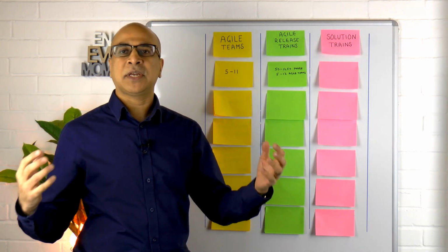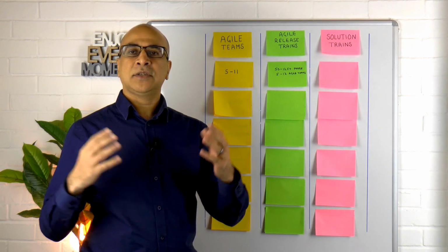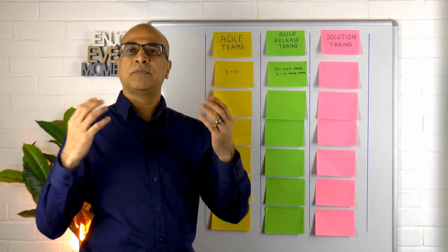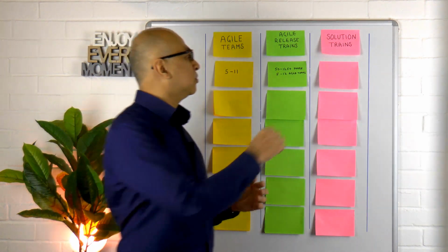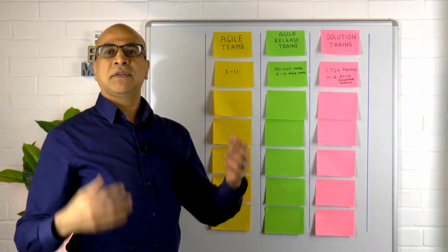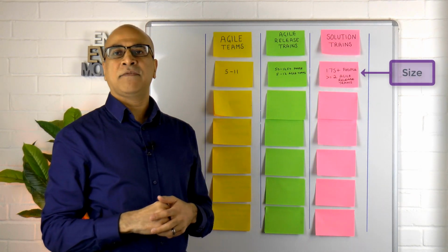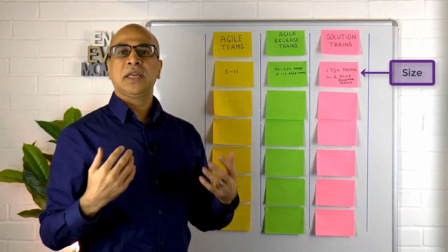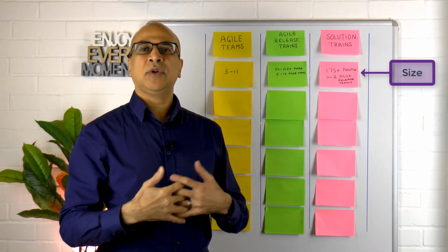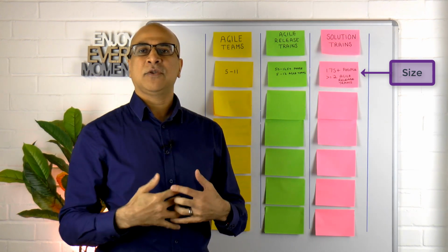When we bunch all of these Agile Release Trains together, they are there to actually support the delivery of a specific solution. Hence, we bring them together in a solution train. So, an example could be 175 plus individuals. If you've got 50 to 125 people in each Agile Release Train, with one full-on train and one smaller train, then probably about 175 plus people in your solution train.